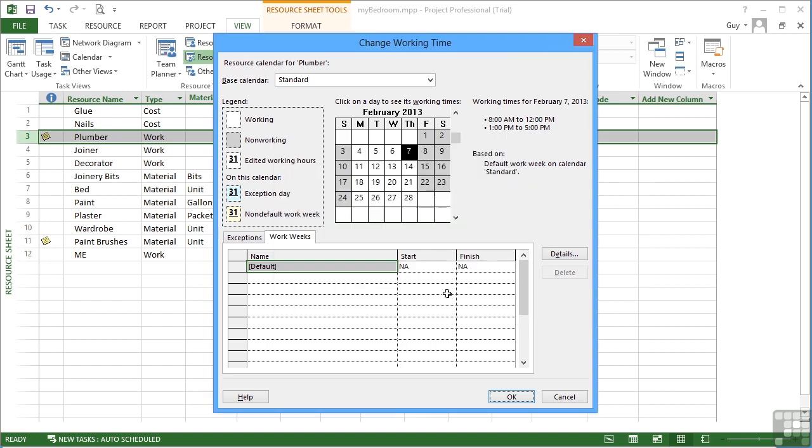When we click OK, in this top section where you get a preview of the calendar, you can see the Fridays are greyed out. They're non-working time. If you assign the plumber to a task that by itself would fall onto a Friday, that would cause it to then be delayed until the Monday when the plumber is available. So altering the availability of a work resource can therefore make a change to your Gantt chart.